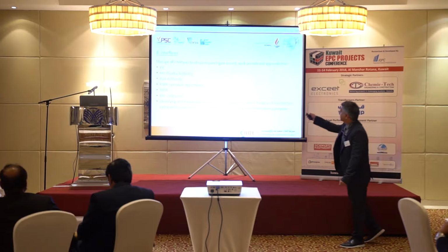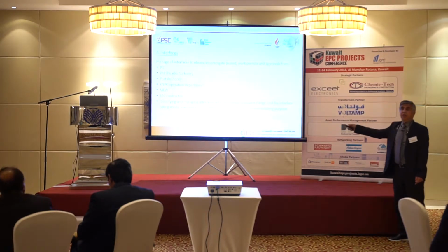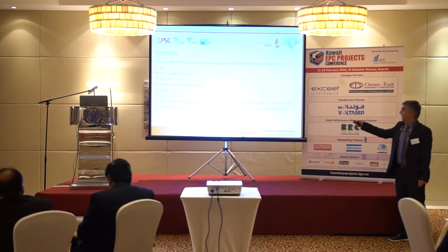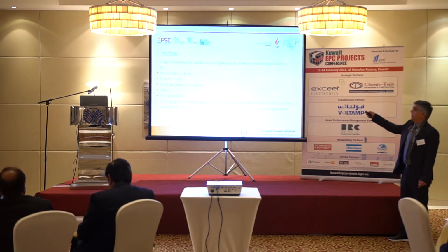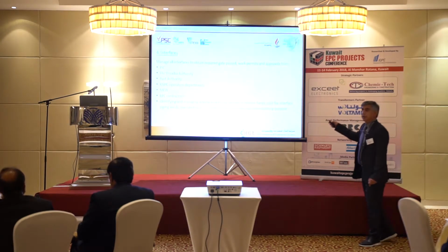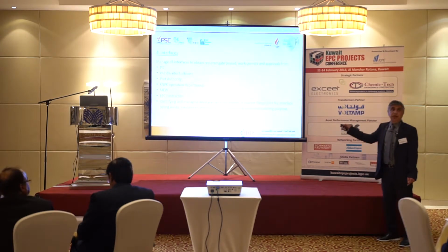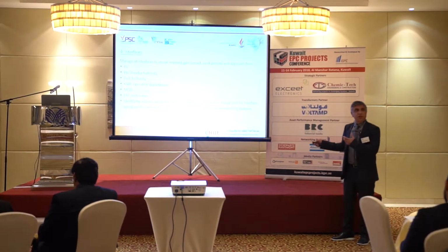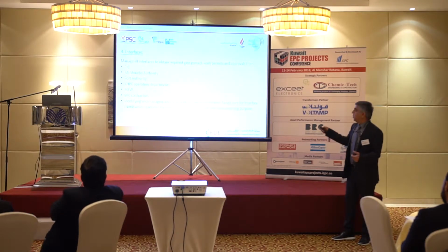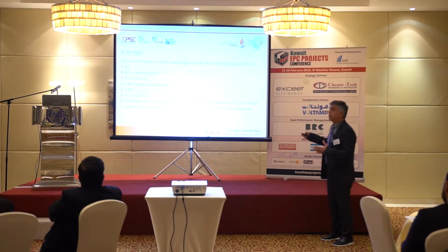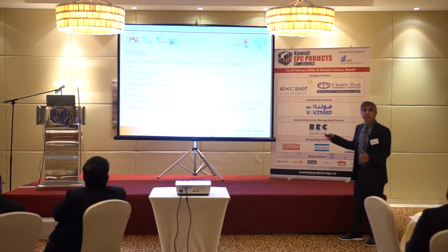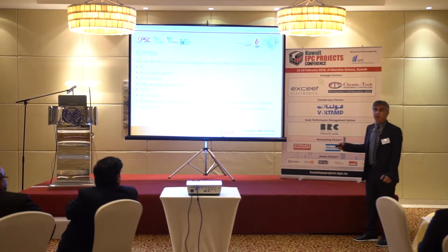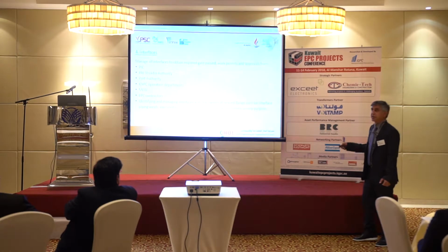Now, as I said before, these are the number of organizations that we have to deal with during the execution of this line. In the planning phase, it is very essential for us at HOT to identify the stakeholders, those who are impacted by this project, so that we make sure these people are coordinated with during the execution. And as a matter of fact, this project is very much dependent on coordination, because as you see, there are so many organizations that we had to deal with.